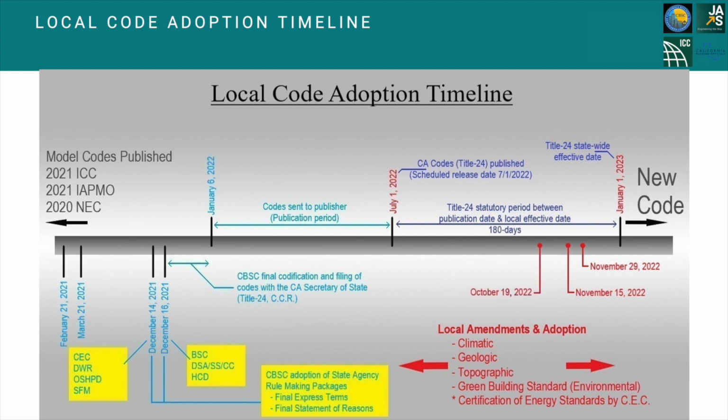As we previously discussed, many jurisdictions promote an open process which encourages public input and interaction. This type of outreach and public input is often conducted through public meetings or by a building department's own appeals board or commission. To determine the third critical date, imagine that the jurisdiction has a building department appeals board that meets on the third Wednesday of each month. If that jurisdiction wishes to hold 2 public outreach meetings with its appeal board, the last opportunity to complete any public outreach and secure a recommendation to the City Council would be Wednesday, October 19th.